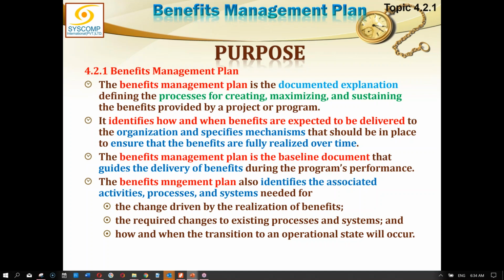So the baseline document, if I can use the word benefit realization plan, is basically the detailed plan, the artifact which describes the ultimate result of the benefit management plan, which in other way is the benefit realization plan. Once that is finalized, that gives us a benefit baseline, right?